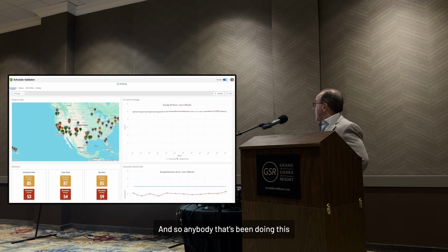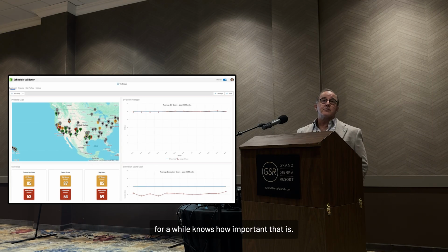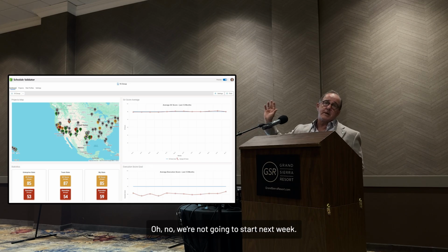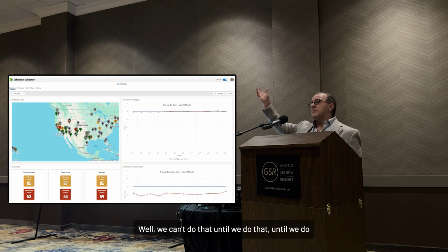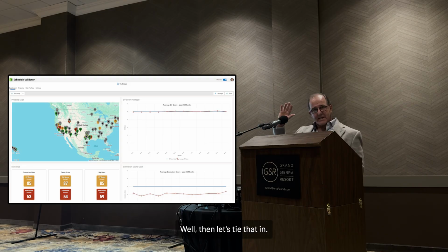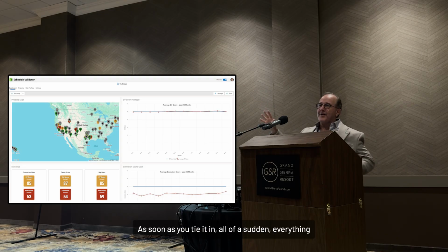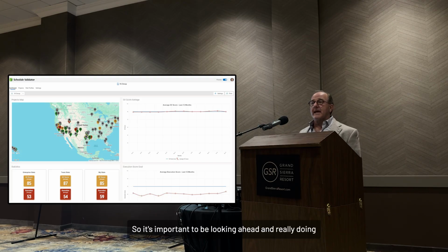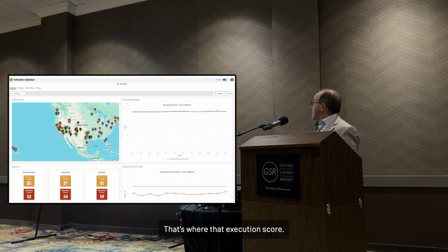And anybody that's been doing this for a while knows how important that is. I'll ask somebody, are you going to start this next week? Oh, no, we're not going to start next week. Well, why not? Well, we can't do that until we do something else. Well, then let's tie that in. As soon as you tie it in, all of a sudden everything goes crazy, right? So it's important to be looking ahead and really doing that. That's where that execution score comes in.